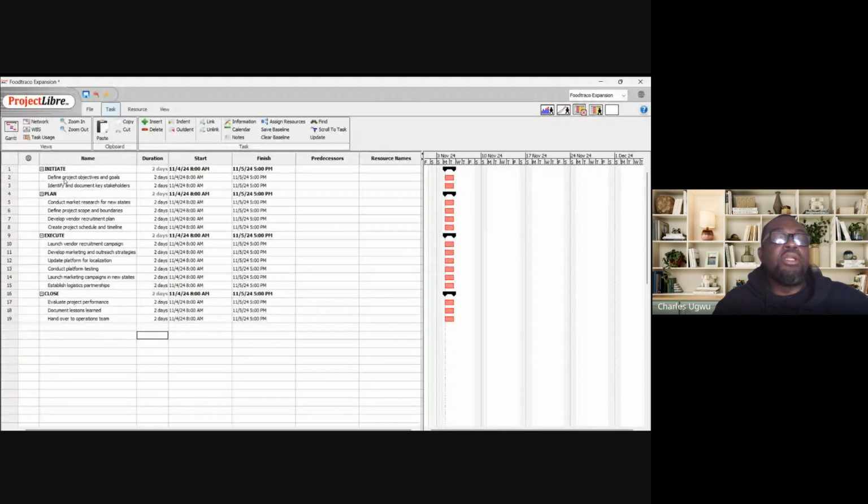We know that defining project objective and goal is number 1, and we want to start identifying stakeholders after defining project objectives and goals. So we come here to the predecessor. The predecessor of this is going to be, let's say, 2. That is 2 here.